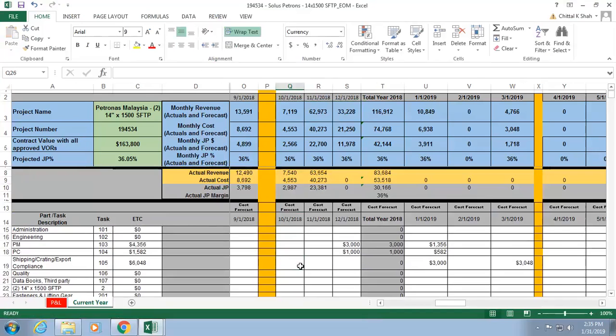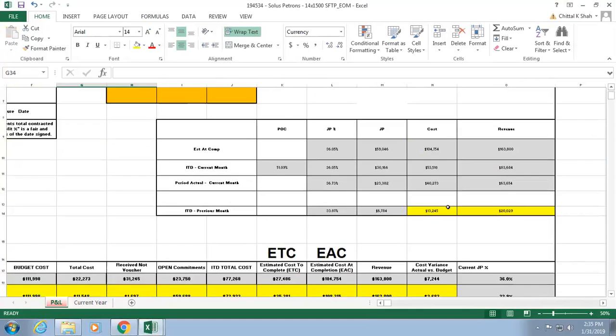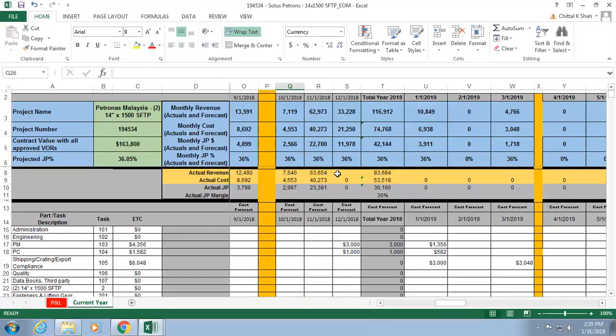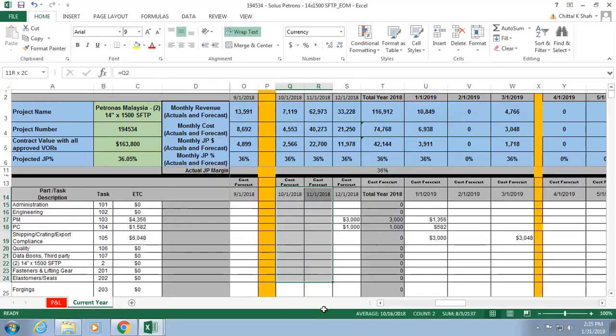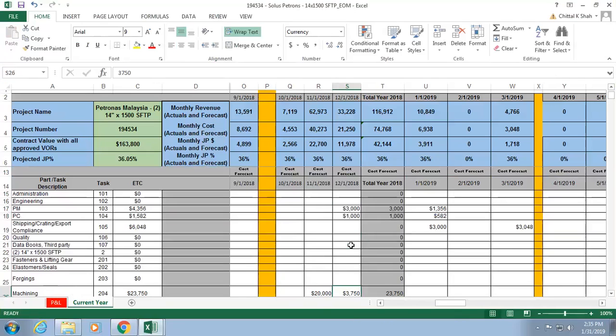Also, whatever your actuals are, you're going to plop it in here. So from the front sheet, for this current month, you have an actual cost and an actual revenue. Those two numbers, you're going to take and paste in for this month, whichever month you're finishing. So instead of the fake value, or your planned value, now you have actuals to put instead. Make sense? So you put actuals over here, and then delete everything else for that month, because all you're dealing with is the future months.